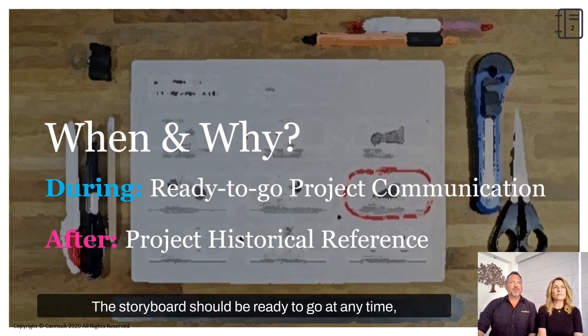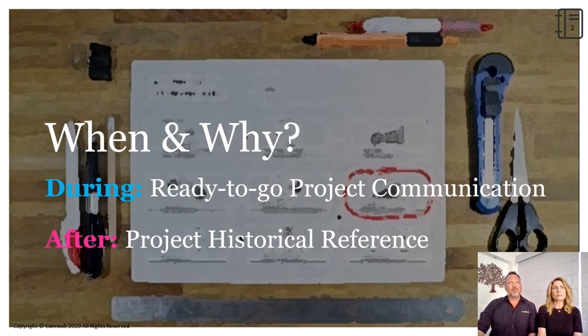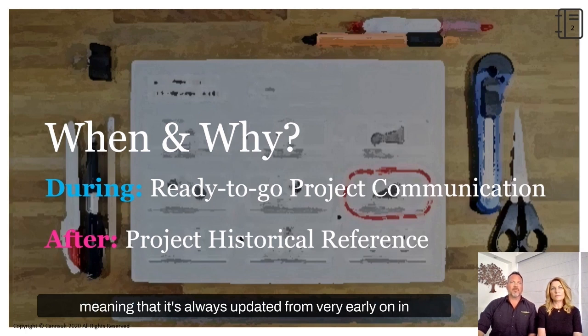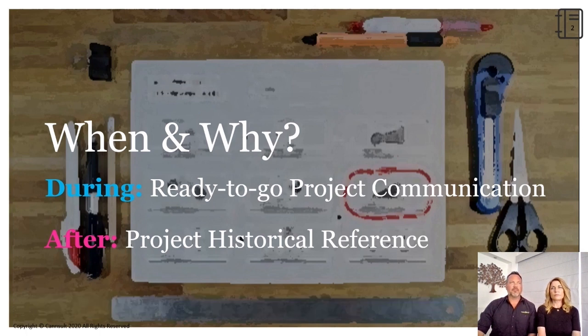The storyboard should be ready to go at any time, meaning that it's always updated from very early on in the project. And at any time during the project, if the team is asked for an update, the storyboard is ready to go. When the project closes, the storyboard will be a valuable document for future teams to learn from the project.